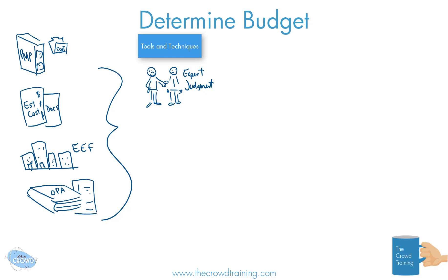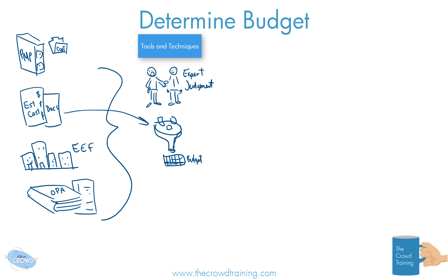Also, if we take all those cost estimates and funnel them together — I'm going to try to draw a funnel here — and we take those estimates and put them all together into whatever package we want to refer to it as, really what we're trying to get to is a budget. So it's an aggregation, and in that case it's called cost aggregation.